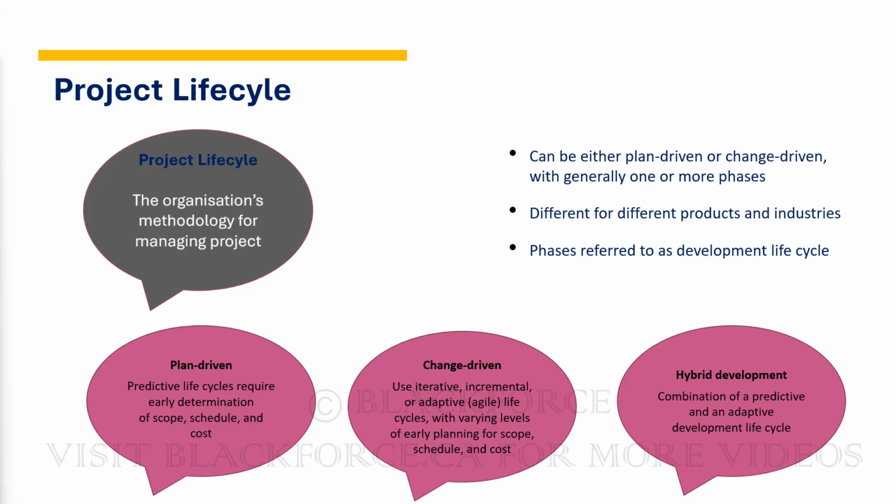But we have been given a budget. The budget they will give us will be a rough order of magnitude budget. They will estimate it, and they will add plus or minus 50% to that budget, right? They will give you that budget and tell you they want this to be implemented within 1 year. So you will now be adaptive in such a way that you start delivering that project. That's where you see the agile method coming. We do some features for sales, we do some features for marketing, we go back, we review, we keep reviewing, we keep getting it done till we are able to finalize.